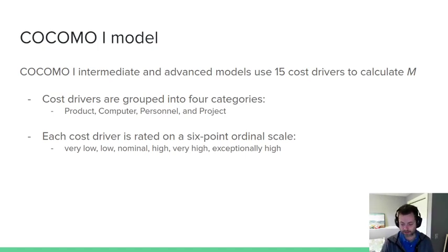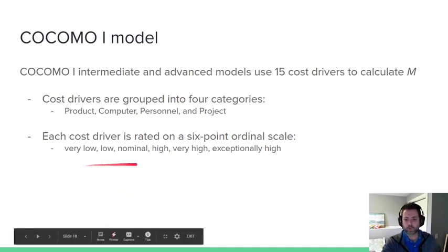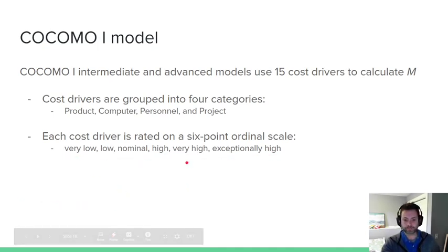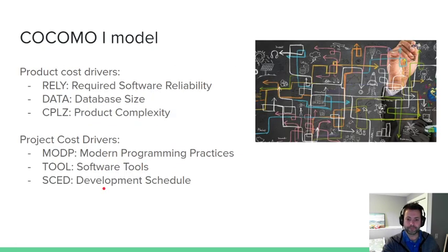So if you go beyond the basic, you get to intermediate and advanced. There are 15 cost drivers for the calculation. So that was that longer table that I flipped through a few moments ago, where based on what you're rating this particular driver, you're going to get a value out of it. And we care about the product, the computers, the personnel, and the project.